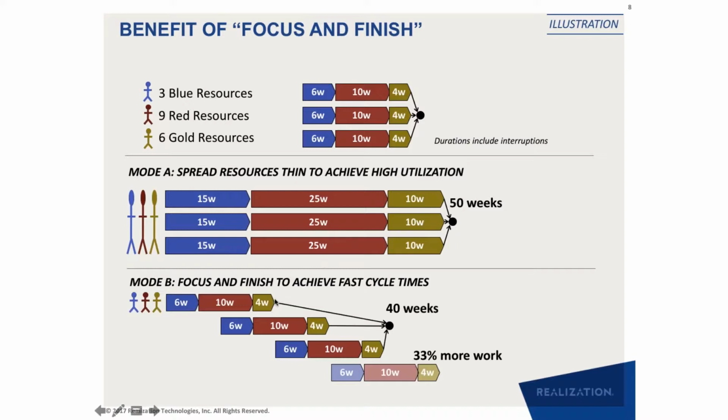But when you think focus and finish, you finish the first project in much less time. So instead of the cycle time being 50 weeks, you are able to achieve it in 20 weeks. Right? So look at the duration in cycle time we got through focus and finish versus the duration in cycle time we would have gotten through the traditional way of saying, let's take half of your estimate, throw away half of it, put half of it into the buffer, right?